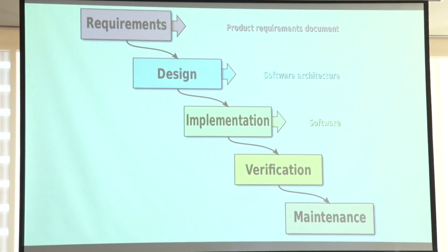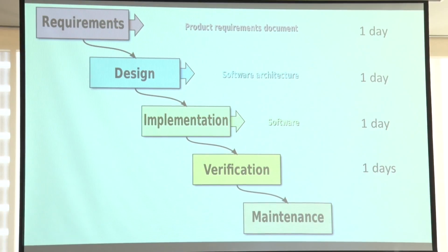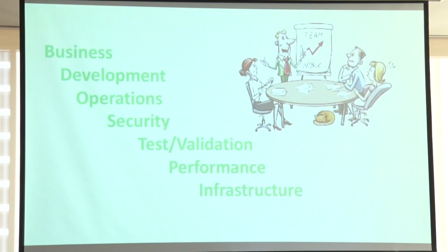So if we take another example, more to what we would be focusing on in software development, and the typical waterfall cycle, if we were to introduce a change, say it's just one change, and each of those various teams needs a day to get their work done, with a day wait time between, we've got at least a week's worth of effort or calendar time that's going to expire before it gets delivered.